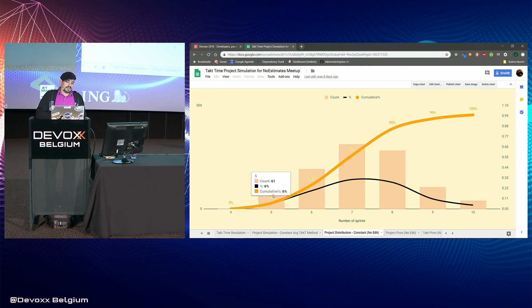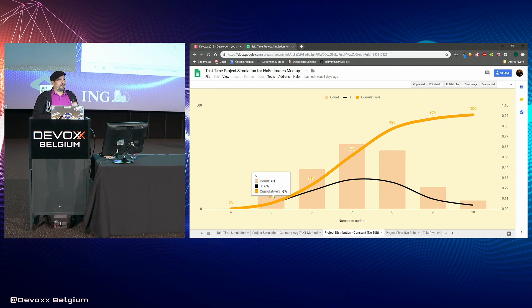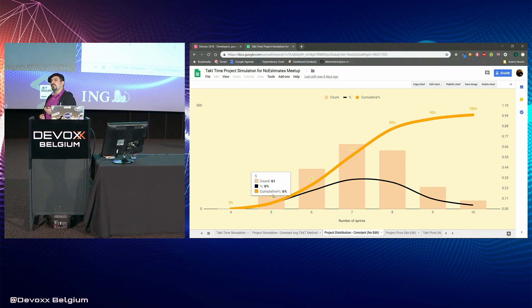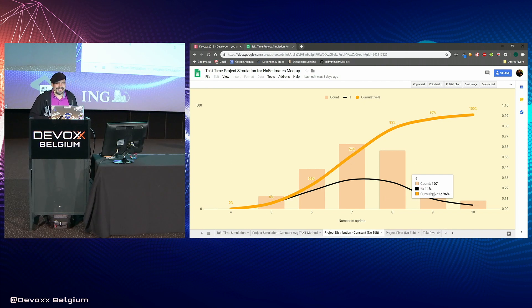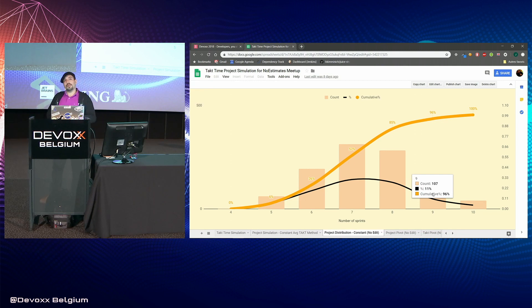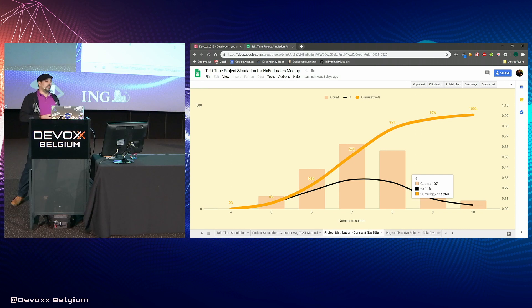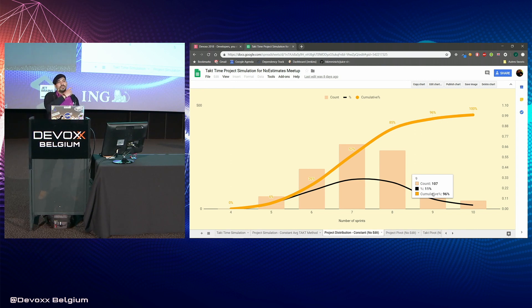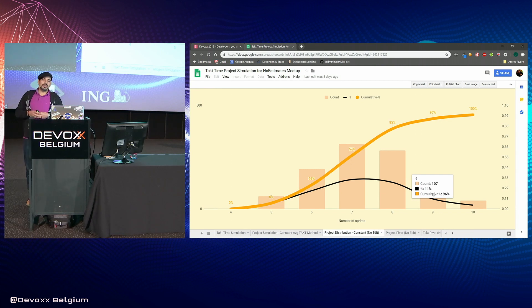This is a distribution of the completion date for each scenario. You can see that only 6% of the scenarios in cumulative have completed in five sprints — so it seems very unlikely we can finish this backlog in five sprints. On the other hand, 96% of the scenarios have completed in nine sprints, so it seems we will be able to do that in nine sprints. We've introduced something that doesn't exist in traditional estimation: the confidence interval. This is how we forecast delivery dates using the past evolution of our cycle time.